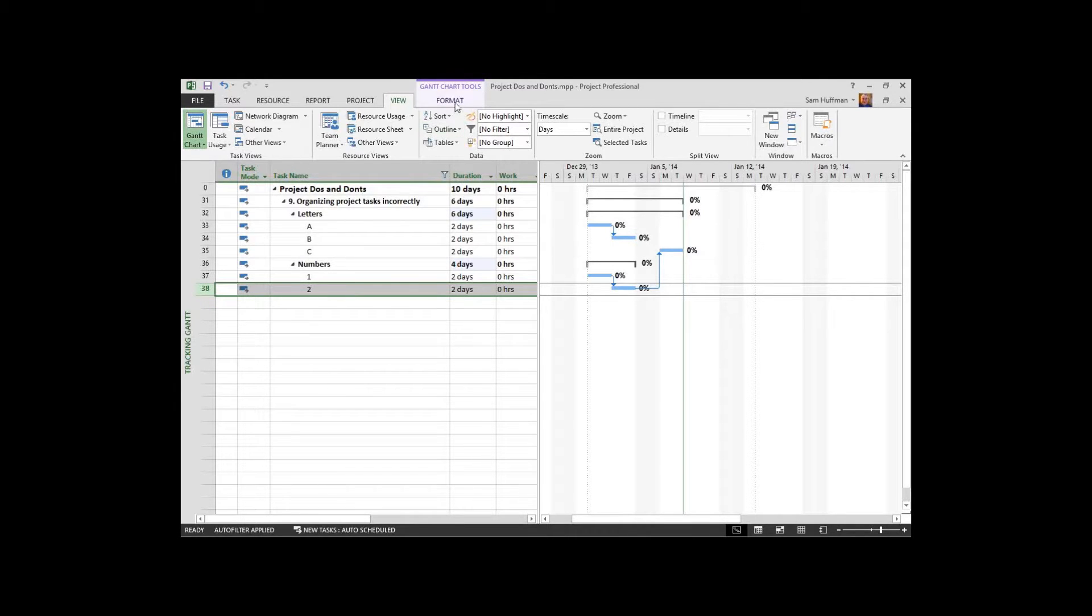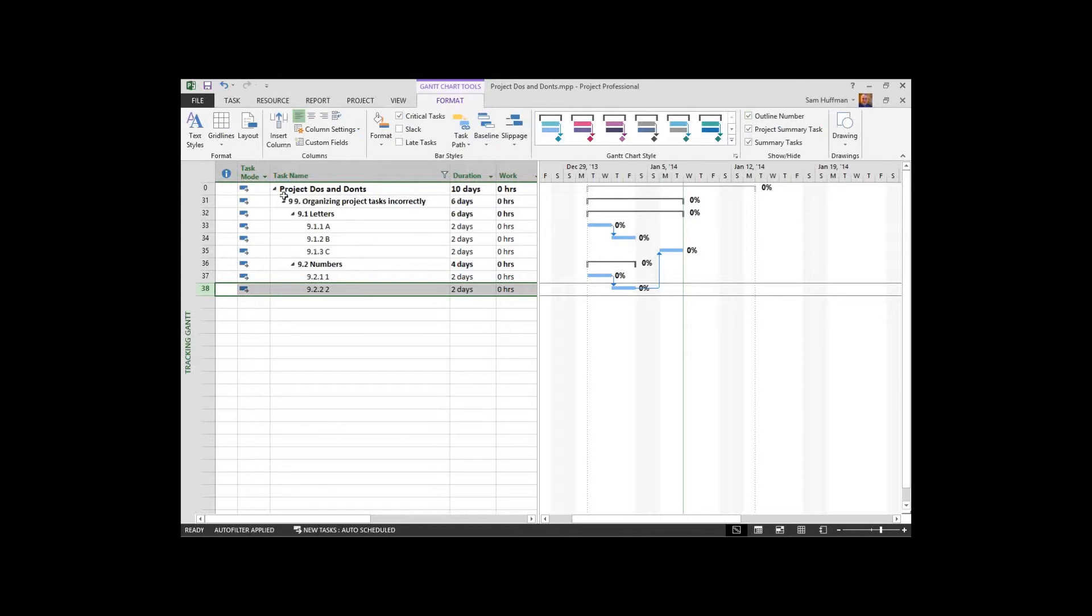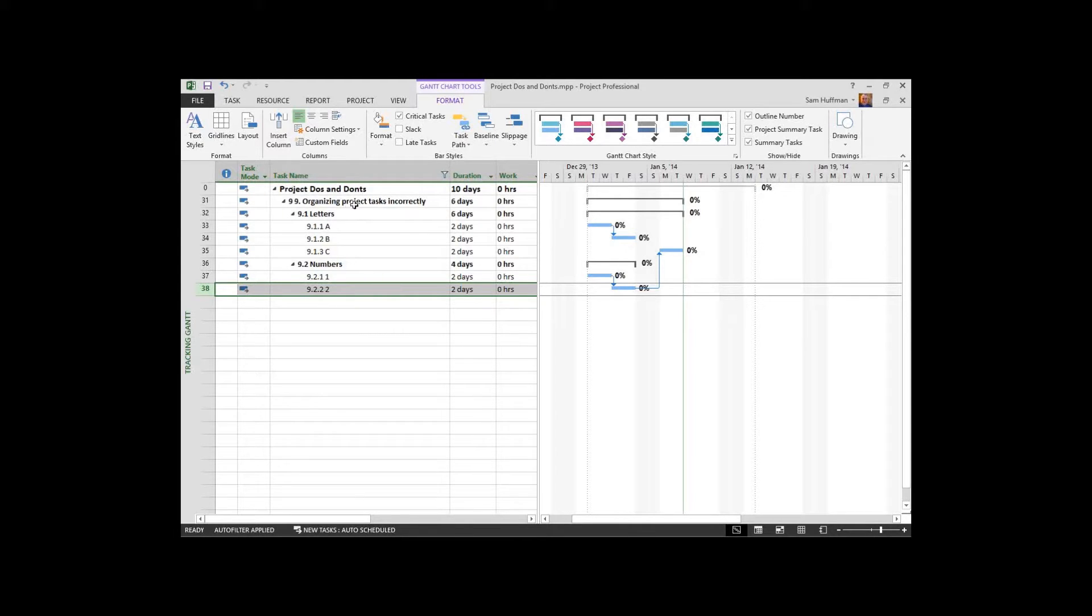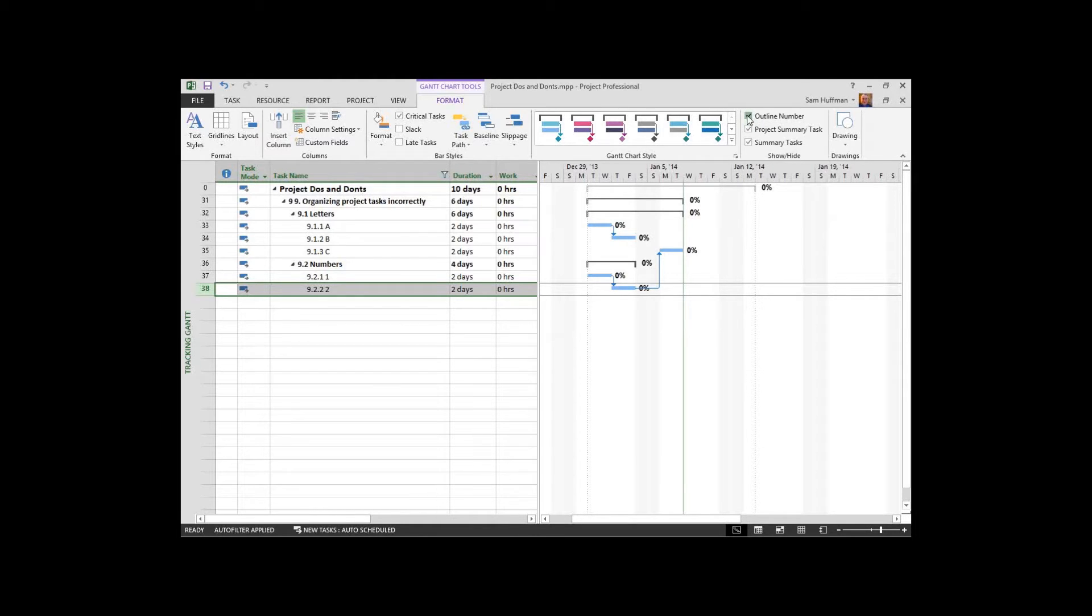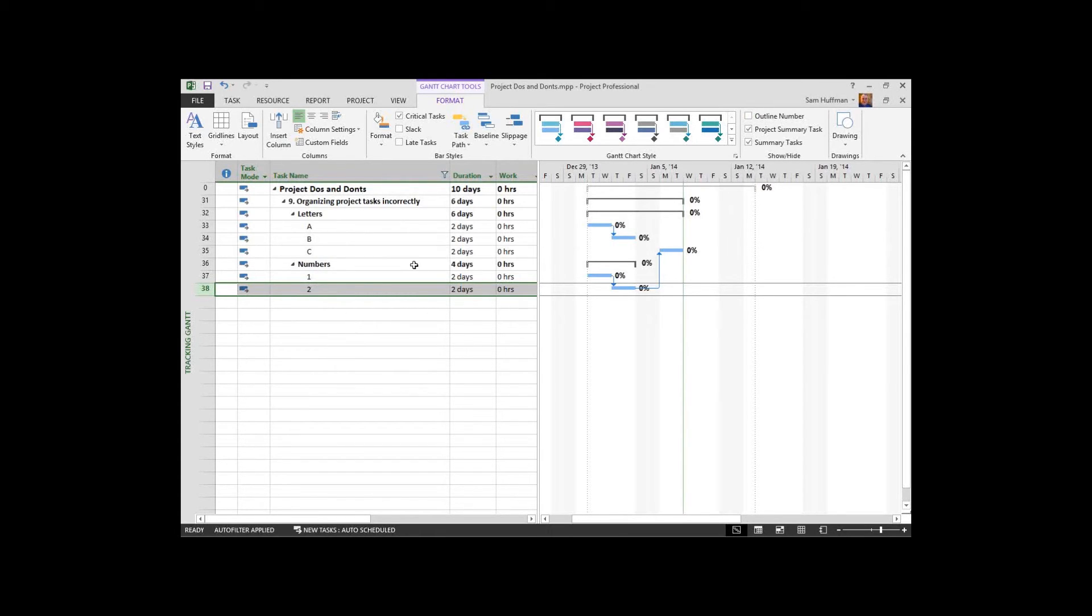I'm going to go to my format tab and tell project that I want an outline number and we'll see numbers now being associated with the tasks. There's also a work breakdown structure field called WBS that will show us this number as well. Outline numbers, think of them as internal and dynamic WBS, the changes with the location of the task. Useful and in alignment with the project management institute and project management concepts in general.